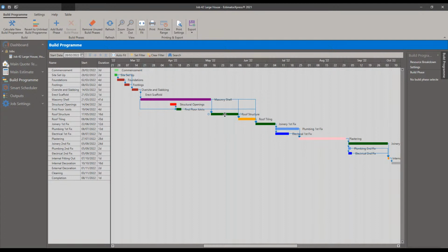You can look at those and stick to them like gospel, or you can look at them and go, right, okay, actually there's a bit more shortages, especially on the roof tiles. I'm going to be ordering them back here. I've got some other jobs that I might be looking at as well. I've got job items around that date. I can just get them all in one go. Better chance of securing all the materials I need. How you go about that can entirely depend on how your storage for those materials is going to be on site and such. So that's for your planning there. But this gives you the ability to kind of see what's coming up and plan for that.